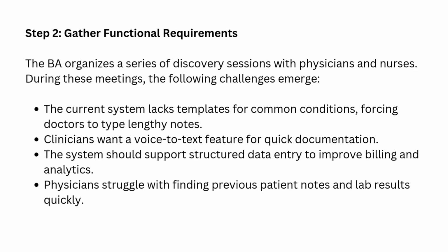So how do you go about gathering all that input from all these different people? Well, there are a few key strategies. The first one is conducting interviews. So sitting down with representatives from each stakeholder group and really digging into their current workflows, their pain points, you know, what they hope to see in a new system. Okay, so really getting into the nitty-gritty. Exactly. And then the second strategy is observing current practices. So actually shadowing clinicians, billers, and other staff members and seeing how they interact with the current EHR. So kind of like being a fly on the wall. Exactly. It's all about understanding the day-to-day realities of each group. That's how you uncover those specific needs that the new system has to address.